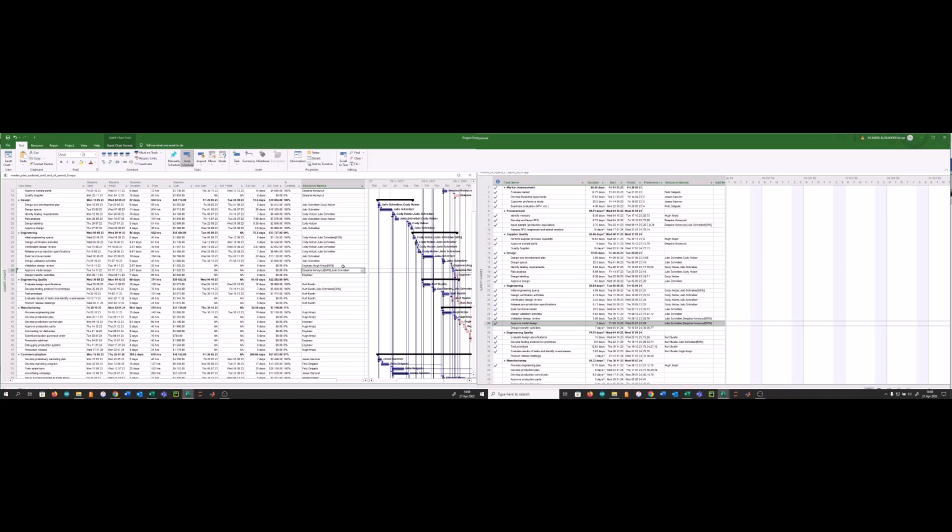Now we want to update the start date, which is Friday 29/12. So actual start date, 29th of December. Unfortunately, I have to go through this tedious process. Right, that's done. The finish date, well, that's not really necessary to update. We don't have to update that. We just have to change the percentage complete to 100%, and it will fill in the finish date for us automatically.